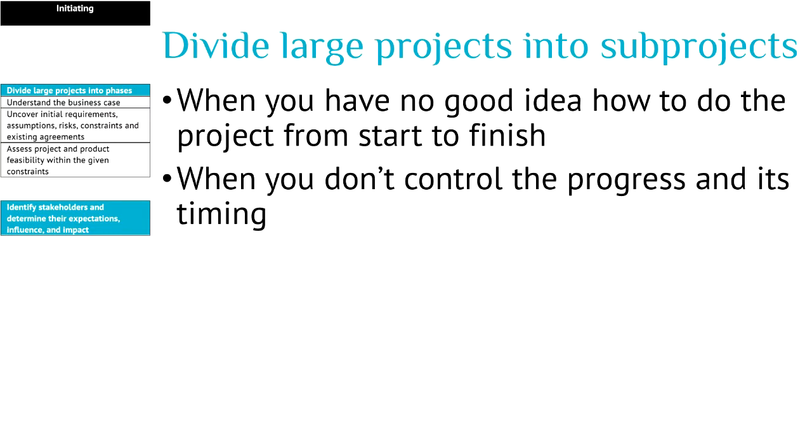If you know up front that the project will be interrupted, or it is likely that it comes to a halt, then either don't start a project yet and wait till you know that it can be finished in one go, or fix any obstacles before you are starting, or break up the project into smaller projects which you can control.